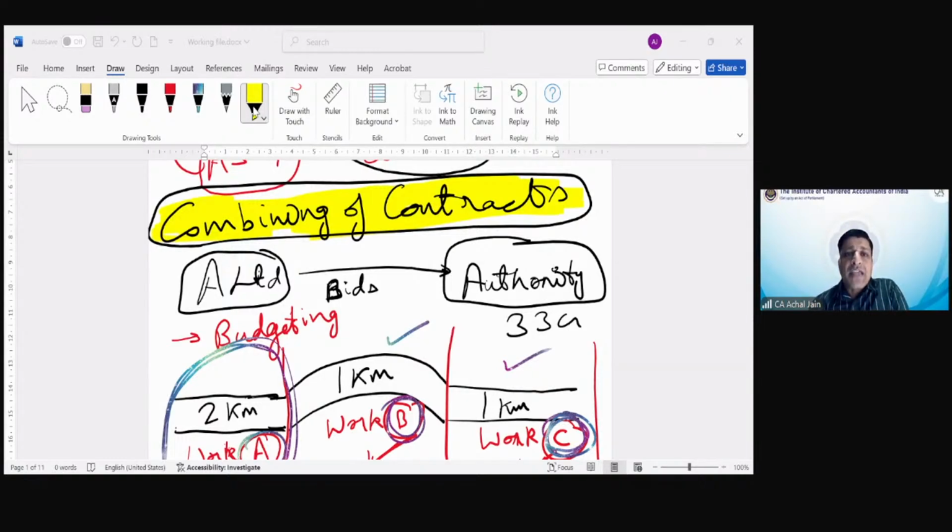Okay, so Sai is asking, the revenue recognition depends on the contract terms. I understand you're talking about the contract terms. Yes, but in respect of the contract terms, what do you need to look at? Two things. One, whether it's a construction contract or not to begin with, and if it's a construction contract, and you find multiple construction contracts, whether you should be combining those or not. So these are the two steps you are required to look at, and accordingly, revenue will be recognized.